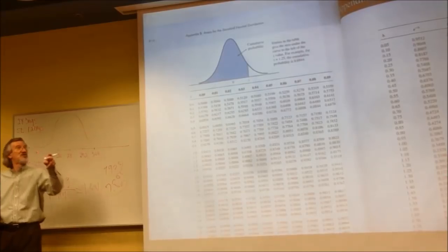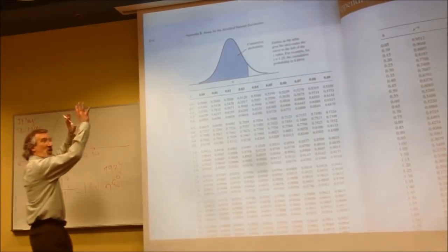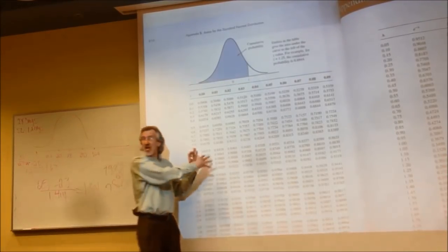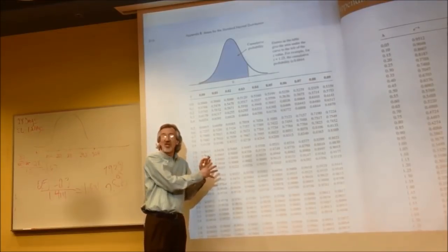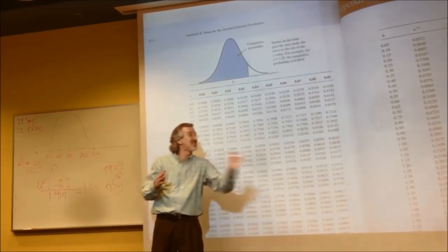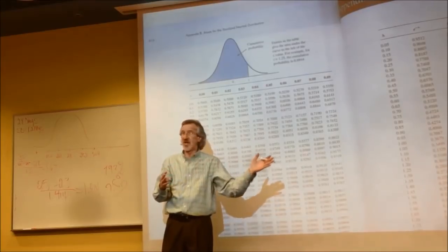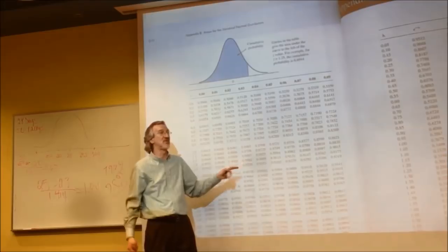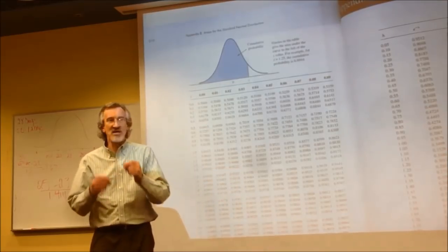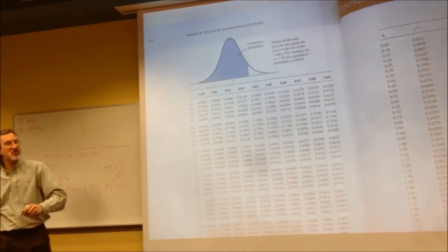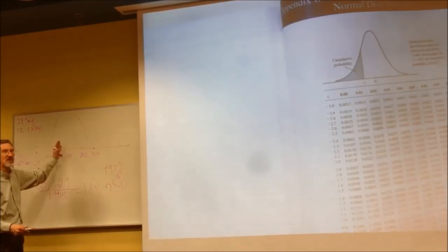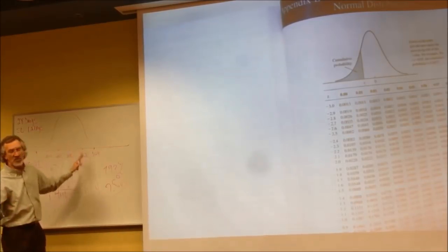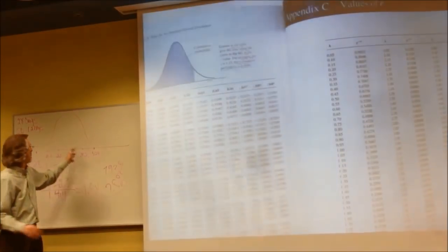But you've got to watch the words. When I say more than, don't forget, anytime you use either page of this chart, it's always giving the probability for less than. Always. For less than. And if the question's asking for more than, you look it up and find the opposite. See how the shading's always to the left on this page too? This is giving you the probability of any number to the left of the middle, and the other one is giving you the probability of any number to the right of the middle, but to the left.